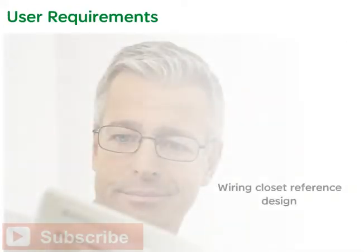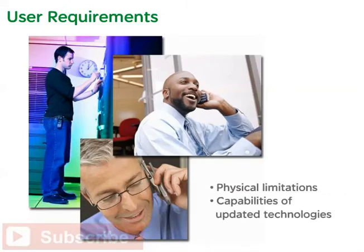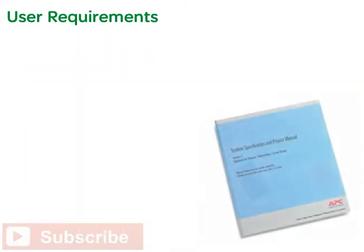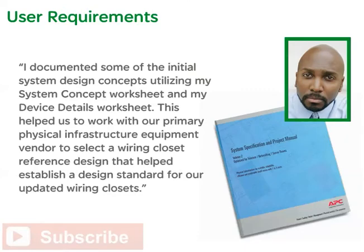Kelly needed to start piecing together enough information to produce an initial wiring closet reference design. To accomplish this, he sat down jointly with Crawford and their electrician, Jason Stewart. Both Crawford and Stewart had knowledge of the physical limitations of the wiring closet sites and understood the capabilities of some of the updated technologies being considered. The team utilized their specification book and the worksheets within to simplify and validate the process. Crawford documented initial system design concepts using his system concept worksheet and device details worksheet, helping them select a wiring closet reference design that established a design standard for the updated wiring closets.